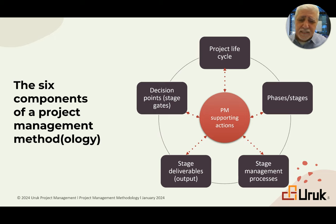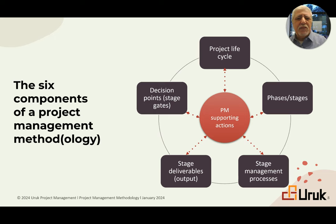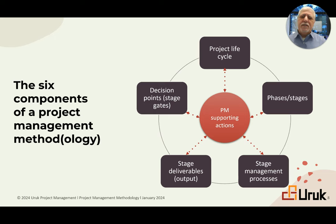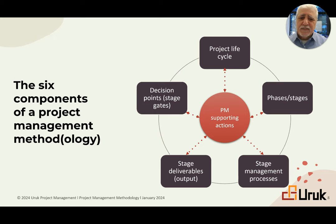The sixth component is supporting actions, placed in the middle because it touches all the others. Supporting actions include scope management, cost management, quality, risk management, and so on. When making a decision at a stage gate, we consider risk. When managing a stage, we manage the scope of that stage. And when defining the output, it likely includes scope, cost, and schedule. So these are the six components of a project management method or methodology.